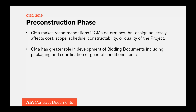The CMA is continually reviewing the design for cost, schedule, and constructability. As construction documents proceed, the CMA recommends how the work should be split into subcontractor and supplier bundles, assuming there are no statutory requirements such as separate electrical or mechanical packages. The CMA also makes a recommendation regarding which contractor will provide general condition requirements — such as site security, fencing, trash disposal, and temporary facilities — for the benefit of all of the contractors on the project.